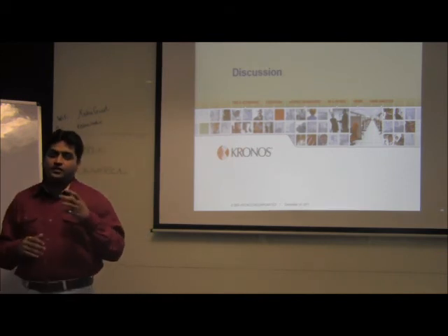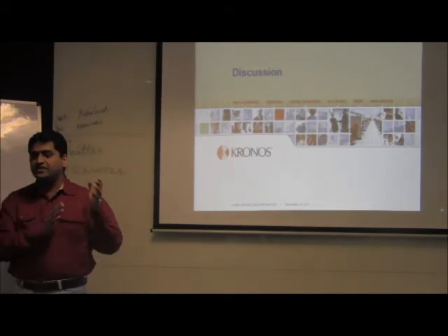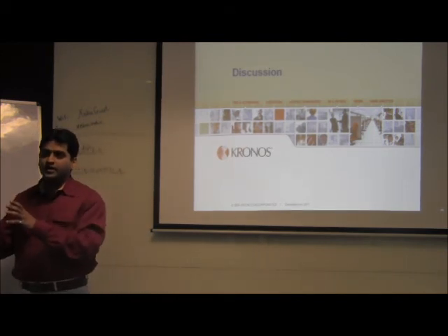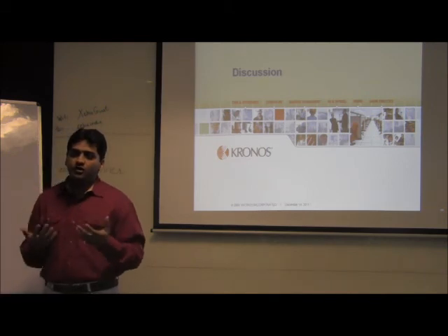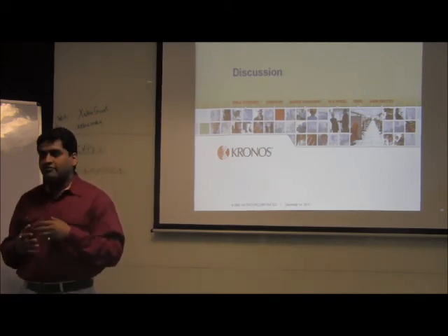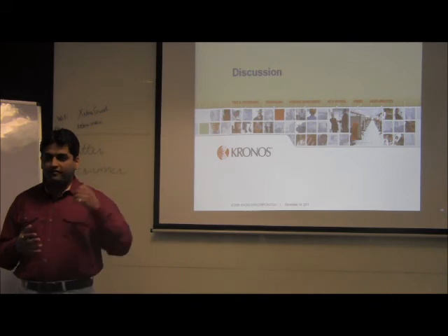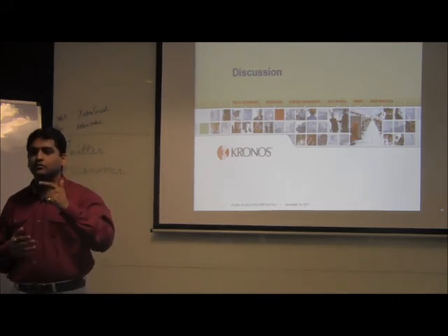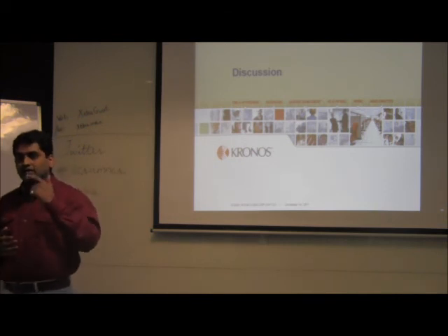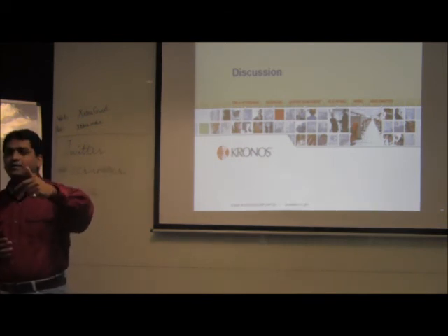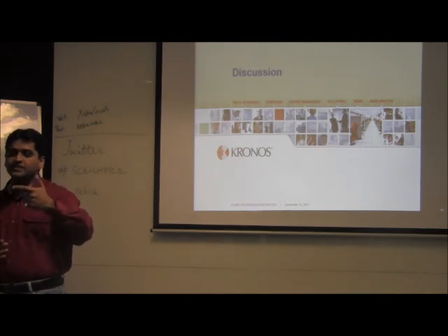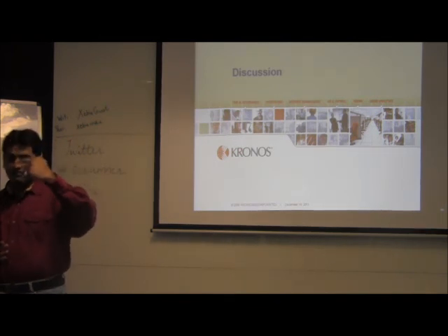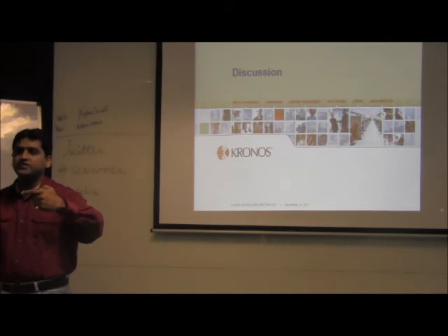So there are different scenarios for a services company and for a product company. Since I belong to a product company, once we see that something is going out of scope, even at an enhanced stage of development, the product owner can take a call that certain features will not be delivered in our first release, but in our first service release.